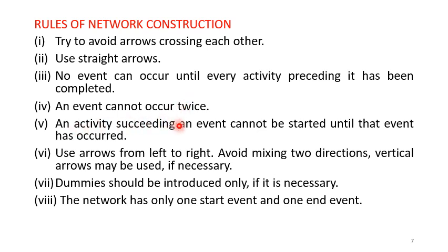Similarly, an activity succeeding an event cannot be started until that event has occurred. So until the event start activity B occurs, we cannot start activity B. For activity B to start, the event has to occur. So the event has to occur first, and we have already discussed that an event does not consume time, it is instantaneous. You will understand each one of this when we solve problems.